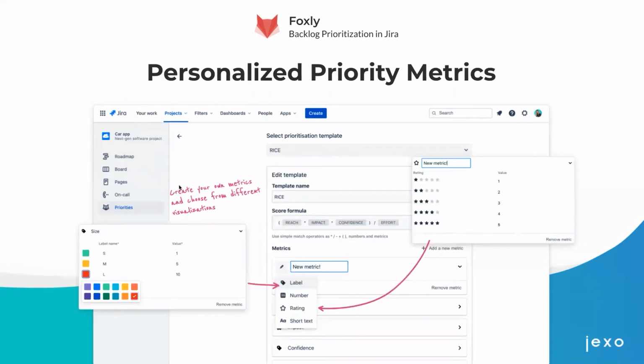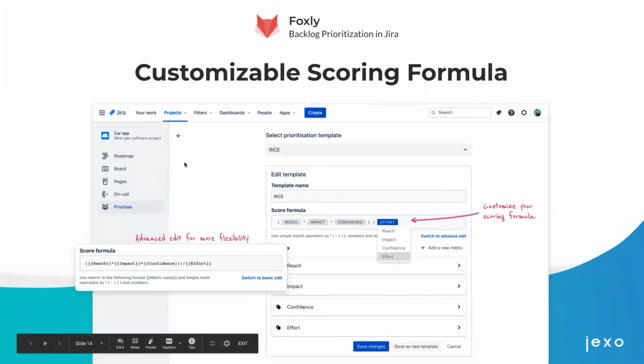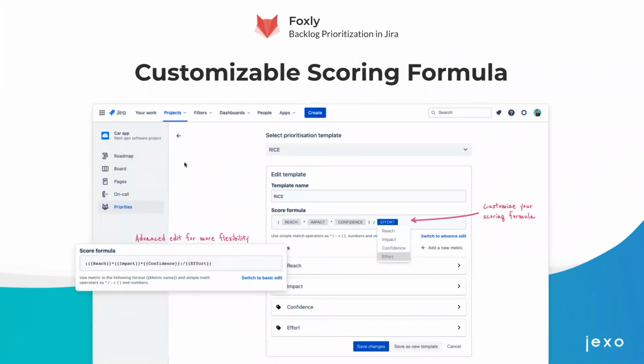You can play around with the existing templates. If your team, for example, uses a different type of options or ratings, let's say you don't use t-shirt sizes and use a different type of mechanism to label those options, you can edit and customize all of that. You can personalize priority metrics, and there are a few types of metrics that you can choose from, like labels, numbers, rating, or text. And most importantly, you can also customize the scoring formula.